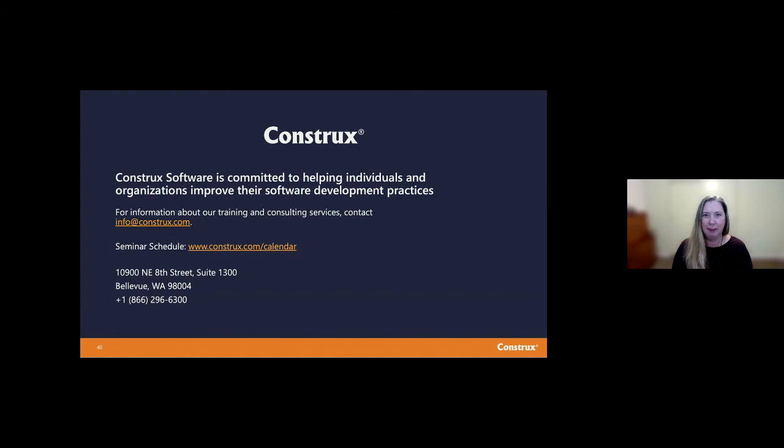All right, Jenny. Next one is, do you recommend setting a WIP limit for the IP state of a column and another for the done state of the same column? No, we want WIP limits that cross both in process and done. Otherwise, done becomes basically kind of an unbounded queue. So we're really trying to optimize value flow, and we want to make sure there isn't a stage that's adding more work in the system that slows down our value flow.